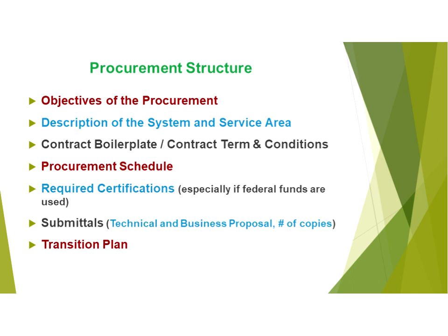And the contract commencement date. Well, here's another factor you might want to ask in your RFP. What's the lead time that the offeror needs? I want to add one other factor. In the RFP, you should be asking for the contractor's milestones to include testing, especially if there's integration with different software suppliers. They should give you milestones for testing, training your staff, running dual, and running live.